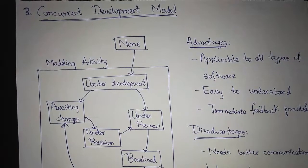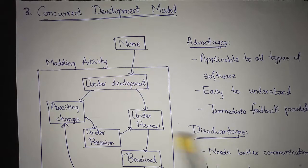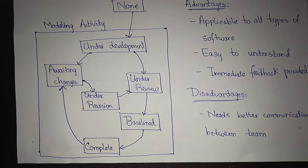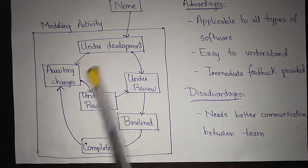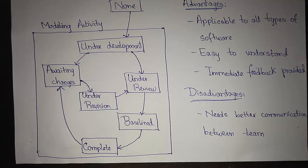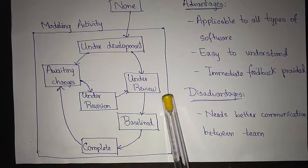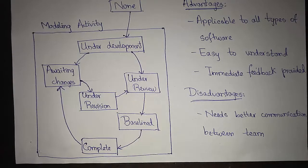The concurrent development model is the last type of model in the evolutionary models. It is developed as a series of framework activities with their associated states. For example, consider the modeling activity. The communication activity is completed in the first iteration and exists in an awaiting changes state. The modeling activity, which existed in a none state when initial communication was completed, now makes a transition into the under development state. If customers indicate any changes in requirements, the modeling activity moves from under development to awaiting changes state. It is applicable to all types of projects and provides an accurate picture of the current state of the project. Here we communicate with both the development and the customer team interactively or concurrently.